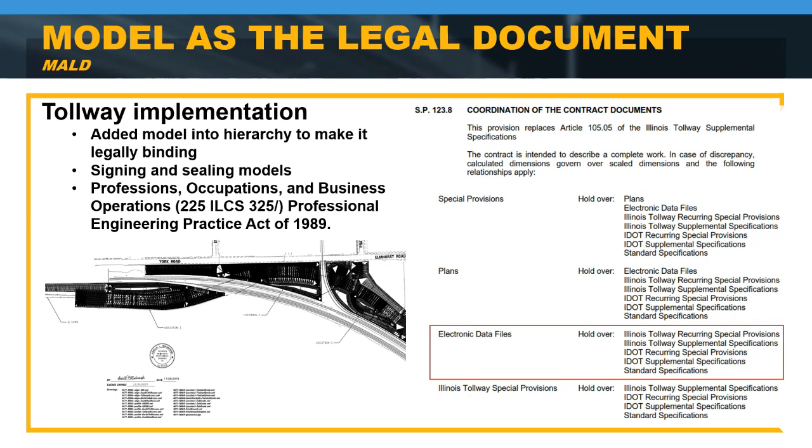To date, we have had to provide a workaround to sign and seal these files because our legislation still requires a PDF stamp for drawings and calculations. To seal the models, we provided a signature page with the seals and the exact files listed. We also included location numbers to help identify the model names and locations.